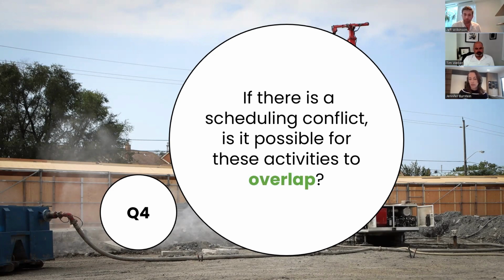That's often done with your under slab drainage contractor, right? And they'll have more unique specifications on their slopes that are required. And you guys, if I'm not wrong, have a little bit more flexibility with your horizontals as far as those tie-ins are concerned. So you follow after that under slab drainage contractor, but coordinating the locations of where you guys are working is really critical.